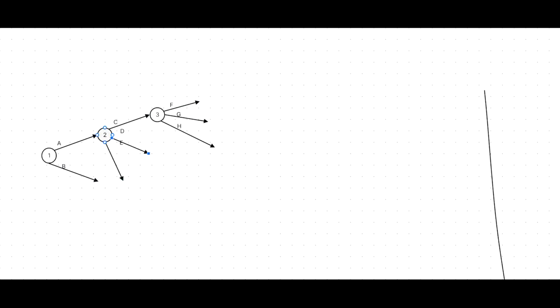Then you can keep the E here. You need to change the direction of D. Then we can complete BD because I already mentioned cross arrows are not allowed. Then after the fourth event, we can start J. After completing BD, we can start J. Now almost 50% complete. Right, let's go to the next one.